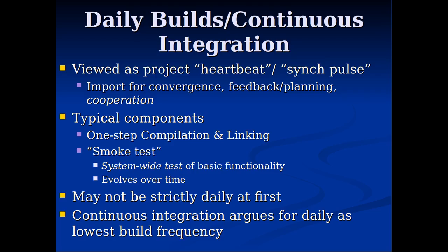And when would you discover that in times of old? Well, there was a phenomenon. It was known, actually had a name, I should note, well before the TV series. It was called the Big Bang problem. It was the problem of delayed integration. And the idea is you'd have different people on a project, all working on their pieces, and then maybe once a month they try to put them together and it just wouldn't fit. The pieces don't fit together because each of them is evolving and the other was coming on the old version and they've come a long way. And so you'd have the Big Bang problems of integration. People would try to put things together and it just wouldn't come together. And it might require weeks of work to get the pieces to work together after they were integrated.